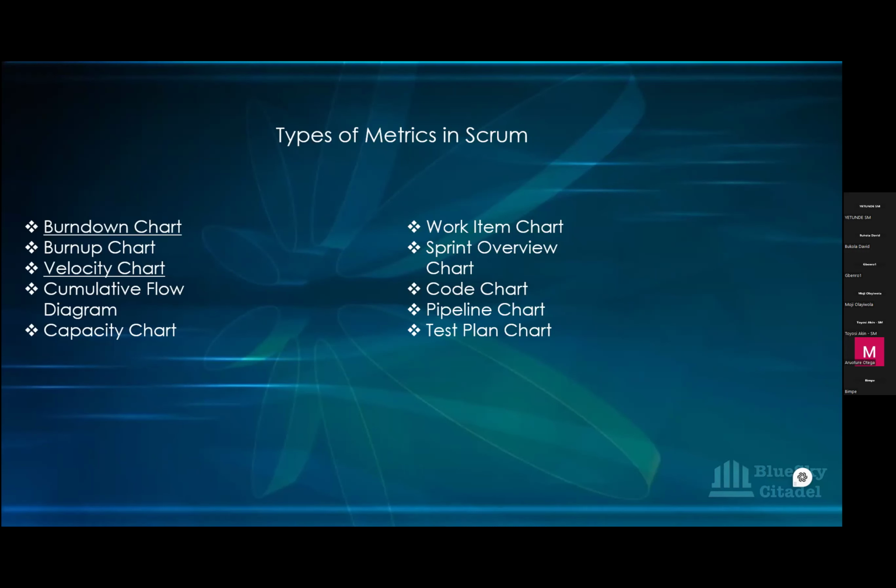But definitely you can track the number of stories. If you want to know the number of stories that your BAs are writing, you can use the work item charts to do that. And most times what you do is you raise a query first, and then you put your query on your dashboard. You can transfer your query to your dashboard. But I think you have to raise the query to do it.